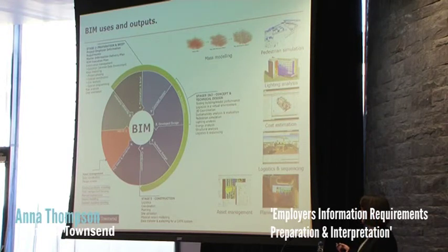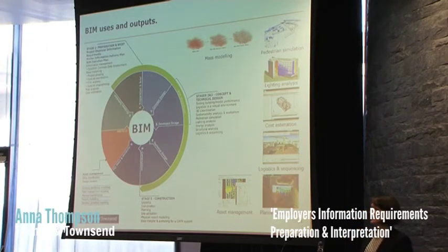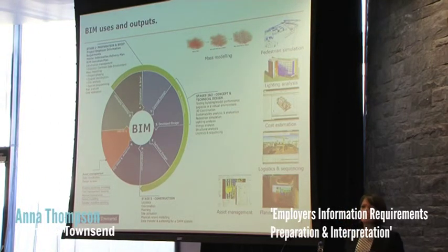The contractors and PMs can break the model down and use software such as Navisworks to be able to create and formulate program sequencing. It's all about testing building performance in a virtual environment. So we're building on this computer before we actually build in real life. Now that's an intelligence that we haven't had. So we want to use it to our advantage to drive the value for our clients. But yes, there's lots and lots of things we could use the model for.